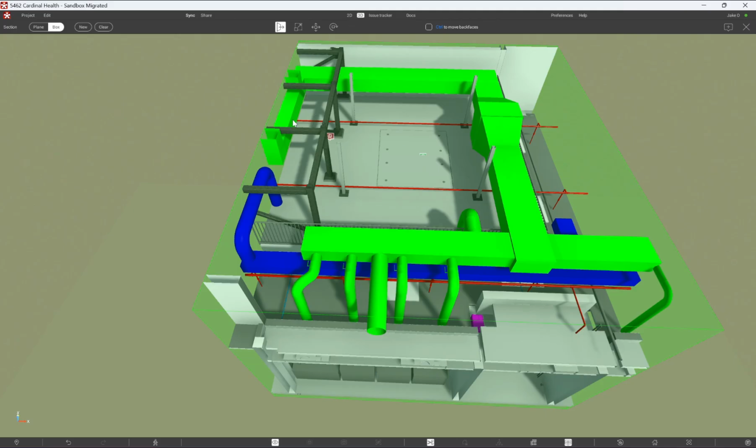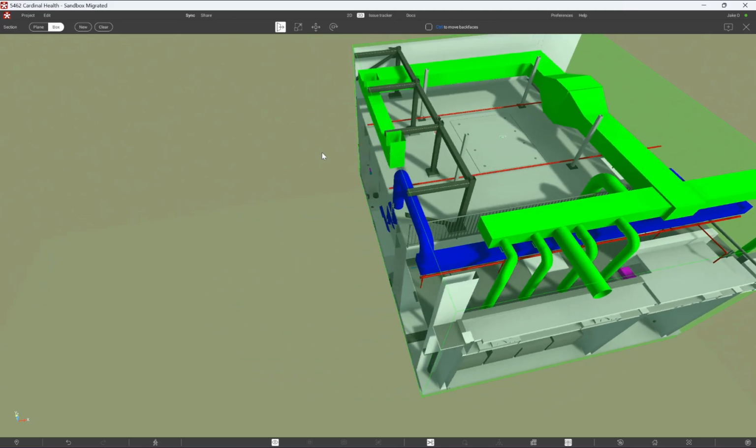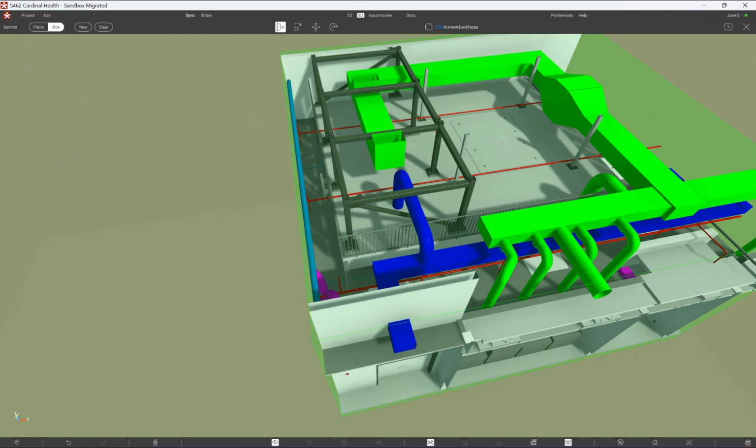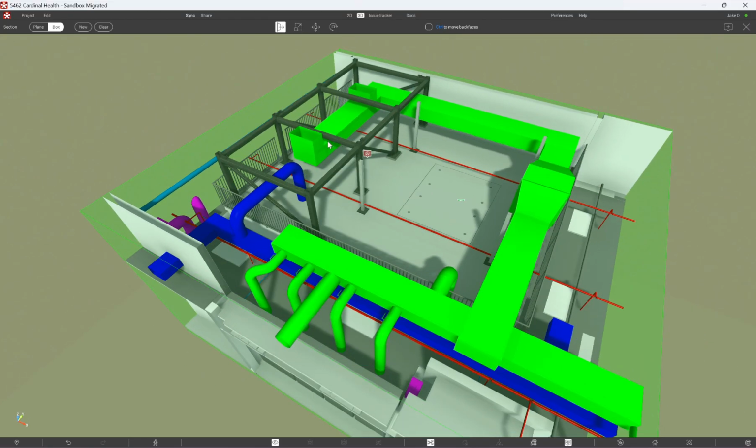It was originally located underneath this 8-post structure. Let me pull this out, give you a little bit of a better view on it. It was underneath this 8-post structure, and the issue with that was maintenance on the filter box. You can't pull the filters when it was under here. There wasn't enough room to get there or pull out the filters, and what that resulted in was having to find a new way to have it set up above this vault while also staying out of the drop zone. So what we came up with was having it come around this way with the filter box on this right side rather than the left.